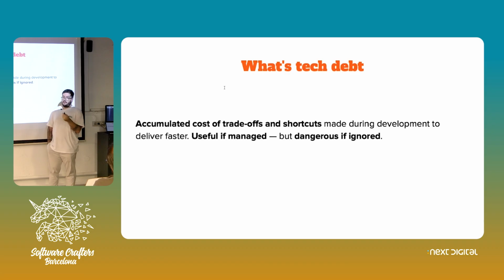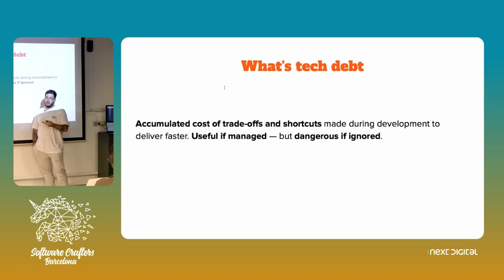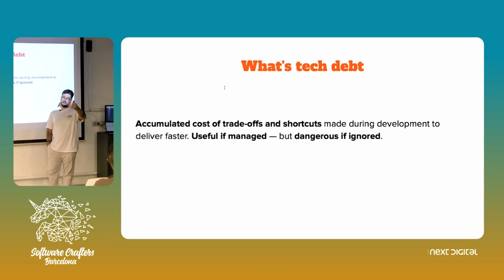So the first one that we need to be able to do as product engineers is make the risk of that tech debt visible to everyone. And the second one, and most important, is to have a commitment from product that we are going to agree to buy this tech debt now, but with a strong commitment that before we start doing new features inside, or after or above this thing, we fix this first.